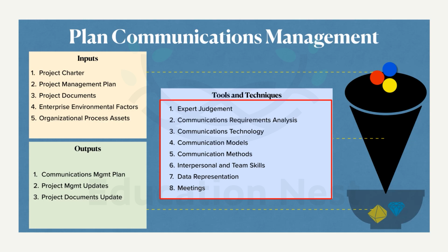The communication requirements analysis, right? So this is something new to learn. It says analysis. What are we analyzing here? The information needs of the stakeholders in the project. What we will do is first identify the void, or the need of the information. So we first identify, okay, here we need some information to be given to a particular stakeholder, and then we also identify the source of this information, who can support with this void. Such kind of analysis is communication requirements analysis.